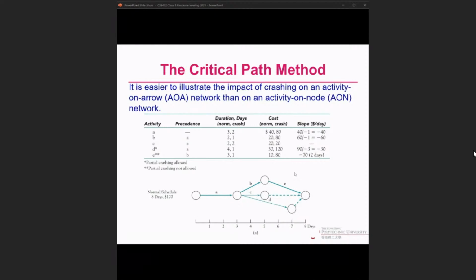And then here, I believe that some students may ask me, because I also mentioned this several times in previous years, but still, the students keep asking me about that. Why should this one be crashed, or why should this one not be crashed? Because they don't really follow the two rules I just mentioned. Okay, because when some critical paths have been crashed, the other paths may become critical. So this is the thing that you really need to take note of. You really need to understand.